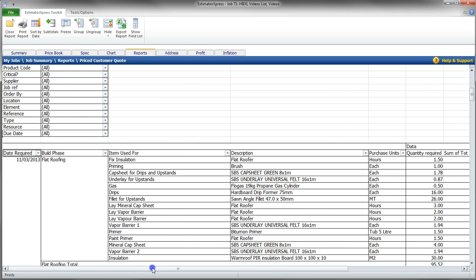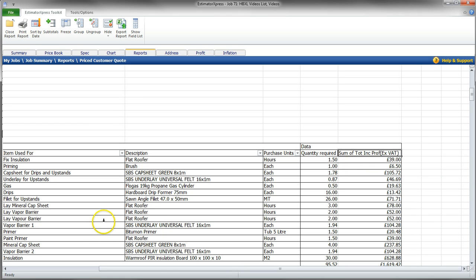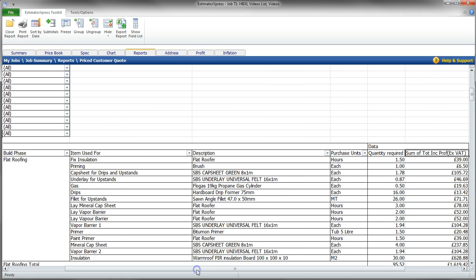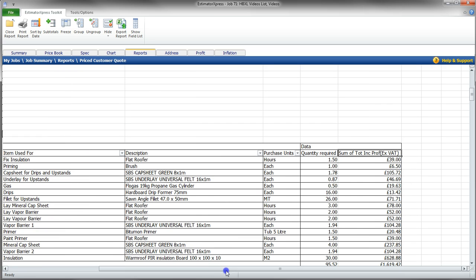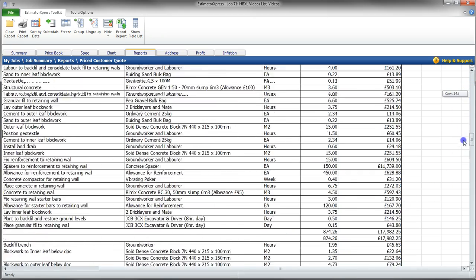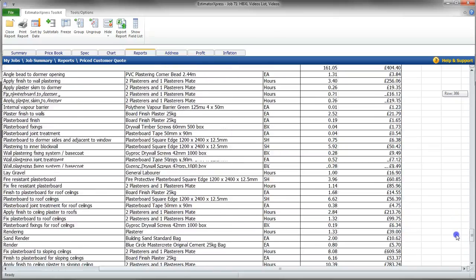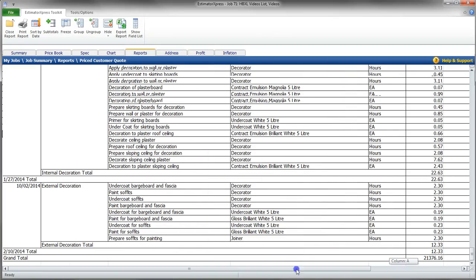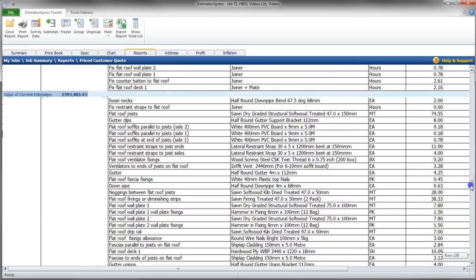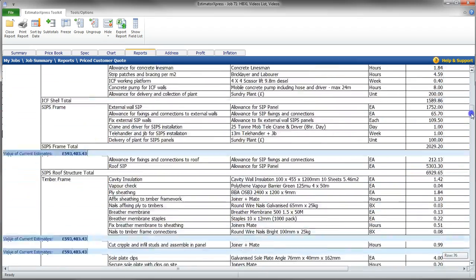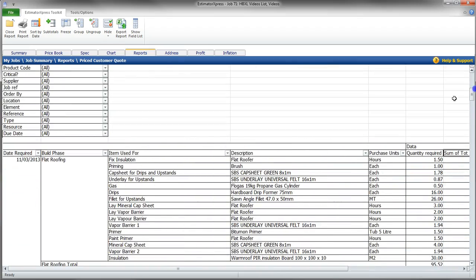This one contains your profit markups. So if you had to use any report from the software that a customer may see, this would be the one to use that you can filter down, as everything would already have your markups involved and would just exclude the VAT. And you have your totals at the bottom there. And once again, if you have used your Gantt chart and set that up accordingly to correct dates, then you can use these dates here to use for material ordering.